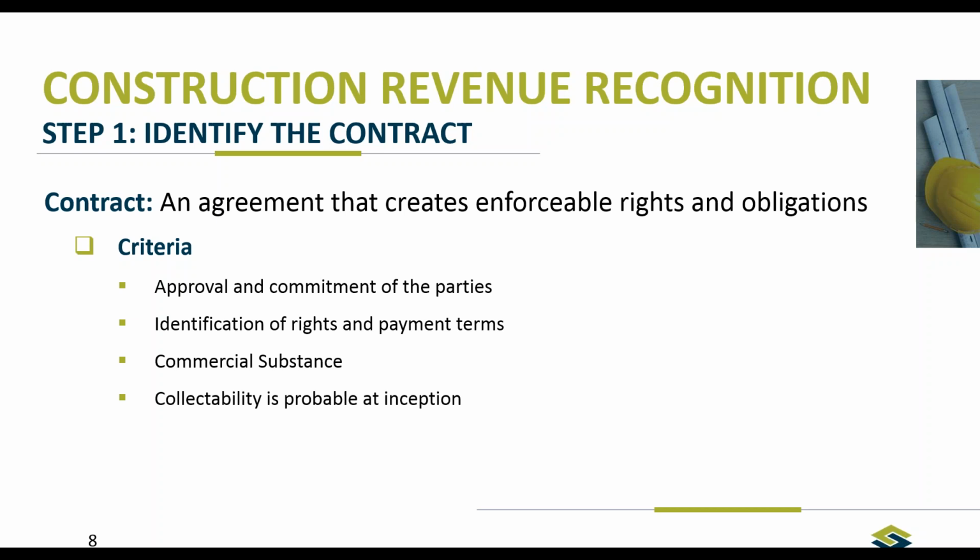You have to assess the likelihood of you being able to recognize that bonus, because now under the new standard, you'll be able to recognize that bonus, and you have to determine the likelihood of you being able to meet that bonus deadline or the liquidating damages. If you feel that you're not going to be able to meet that deadline, you have to account for that cost. And usually under the old standard, you would account for that in the estimated cost to complete. Now it's upfront with the contract value, and you have to back those things out of the contract value.